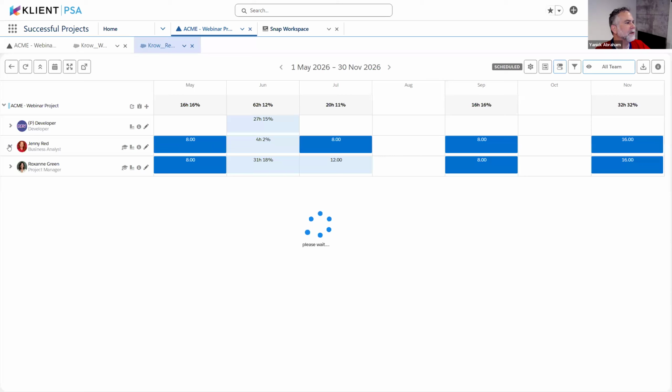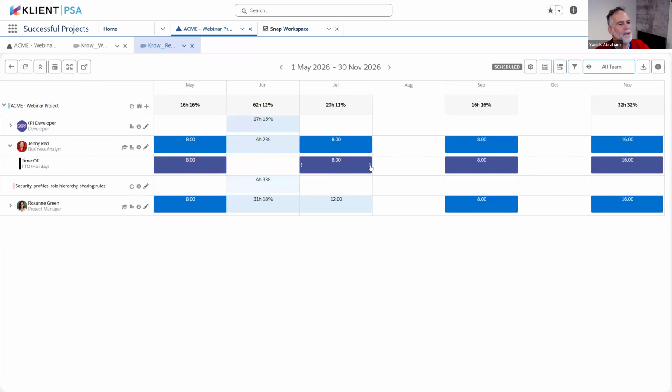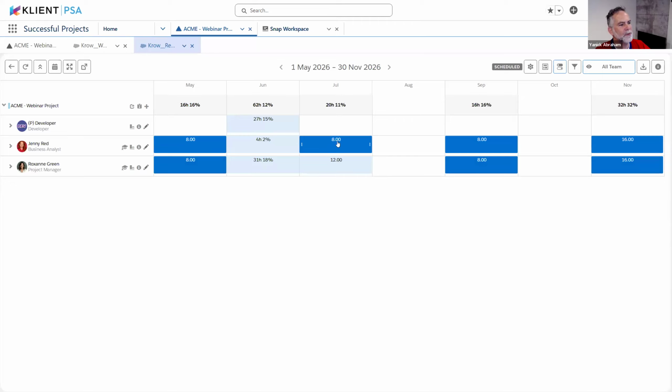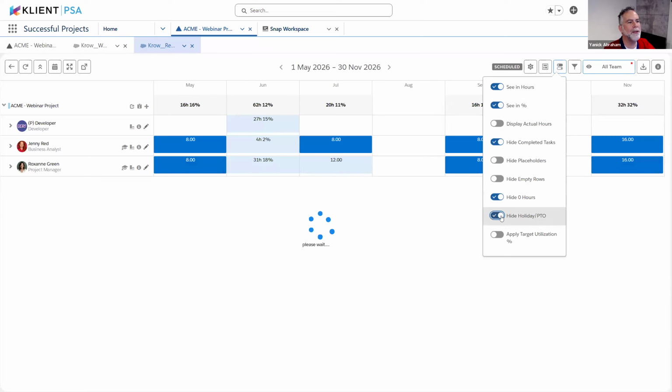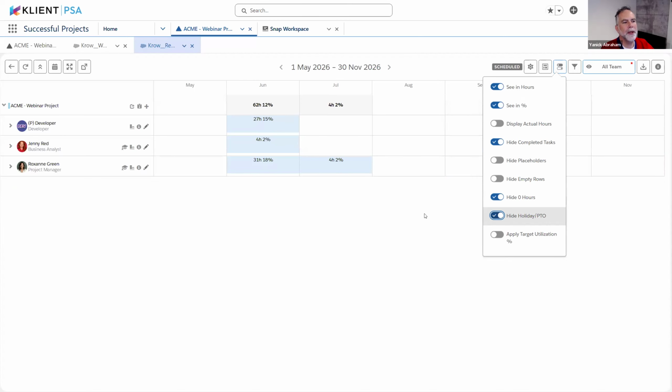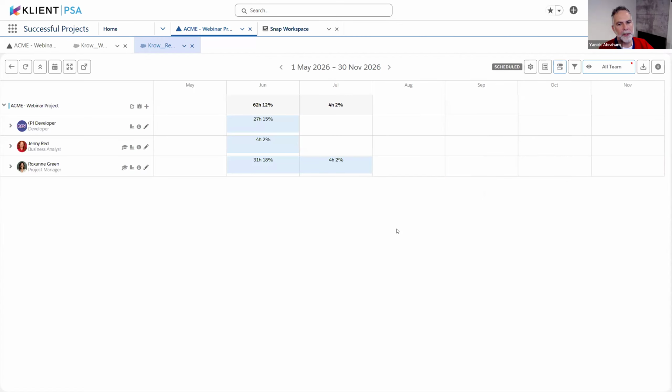So if I expand Jenny, I'm going to see those are time off hours. And they do add up into the month's calculation. So you can see, for example, that Jenny Red has 8 hours of PTO plus 12 for 20 hours, which is 11% of her workload. Now we have an option to hide PTO, and then the recalculation is made as well.